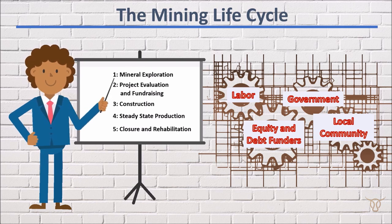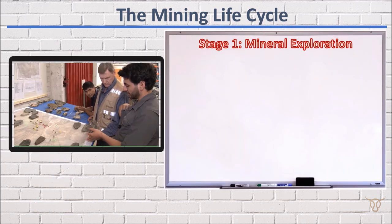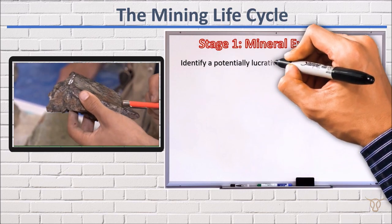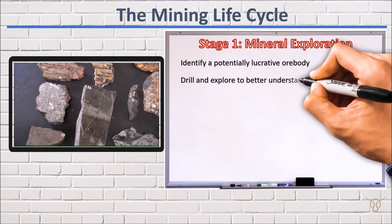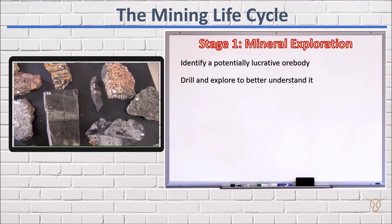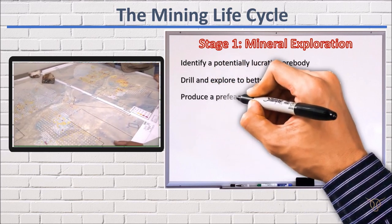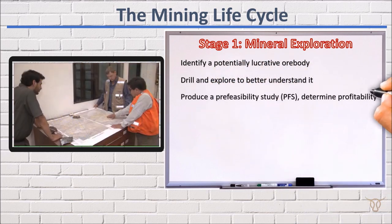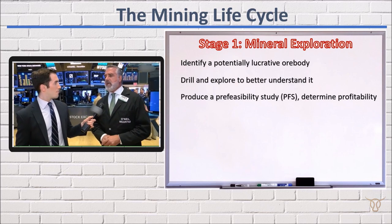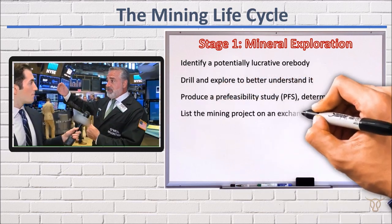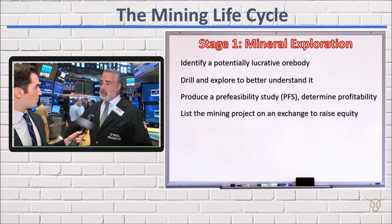Let's begin with Stage 1: Mineral Exploration. Here, sponsors identify a potentially lucrative ore body but still need to drill and explore the ore body further in order to better understand it. This stage culminates in a pre-feasibility study combining results of drilling and exploration with a preliminary financial assessment of the project to determine its profitability. Once sponsors are satisfied that the ore body could be profitably exploited, they would typically list the mining project on an exchange in order to raise equity.